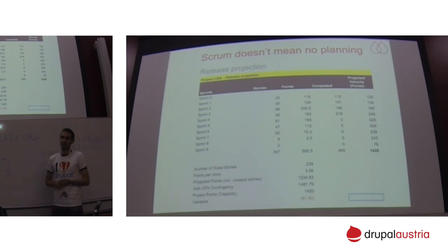But then the question goes with the client. Because some clients really want to see hours, and in order to complete that and to see hours in advance, I mean, what is going to be invoiced to us, or how this project looks in terms of hours? Then if you say, all right, the team is going to work 9 sprints and, because these guys are full time dedicated, we have this amount of hours. Then on the other hand, they have the user stories estimated in story points. They're going to ask the other question: yeah, but are you going to be able to deliver those story points? And what is the hourly rate for these story points? Then obviously you're forced to do this kind of mapping.